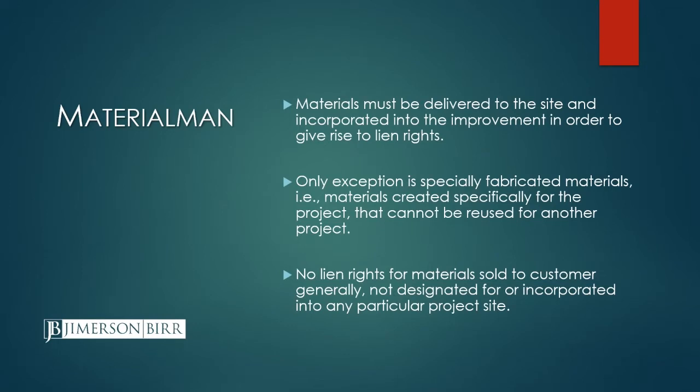So one other thing here on delivery to the site and incorporation to the project. As you might imagine, that can be an issue for a supplier to prove that its materials were actually incorporated into the project. So the lien law in section 713.0112 expressly provides that if a supplier provides proof of delivery to the project site, that constitutes prima facie evidence, which is basically a legal term for that's enough in the first instance for the supplier to meet its burden that its materials have been incorporated and it has lien rights for those materials.